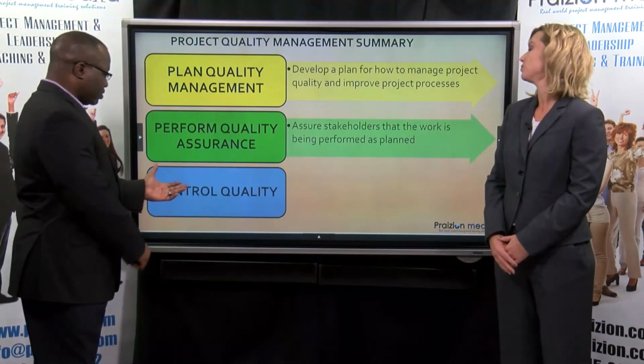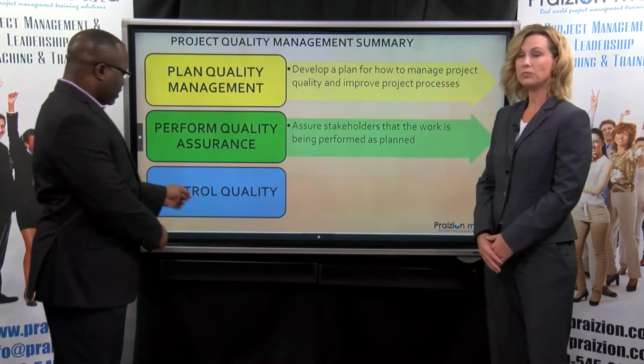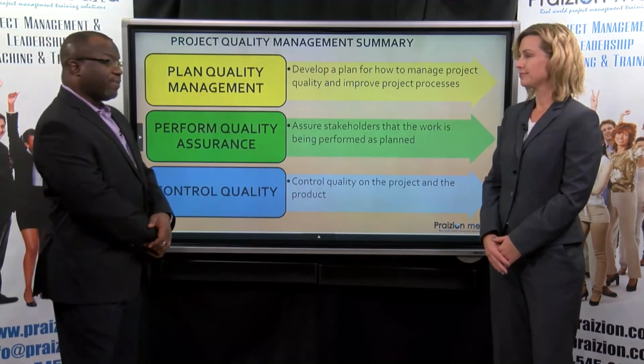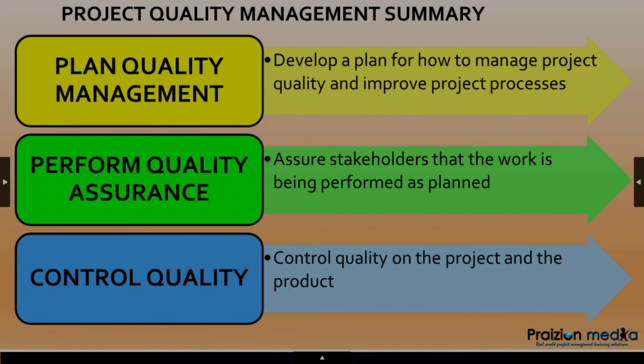So we're hopping across to monitoring and controlling. In this one, we are controlling quality. And to control quality, you want to inspect the deliverable. You want to make sure that that deliverable is fit for use and conforms to requirements.